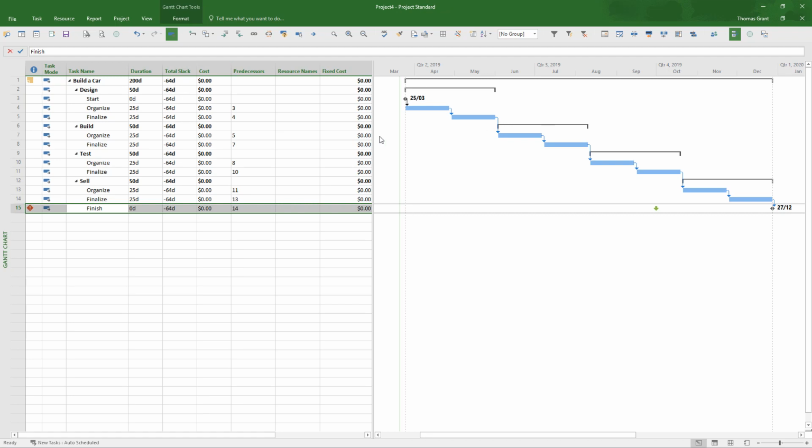So there's several ways of shortening the project. You could reduce the scope, you could try adding more resources, or you could try for overlaps. So we're going to try for overlaps in a minute. What I'm first going to do is put some resources in on the activities.